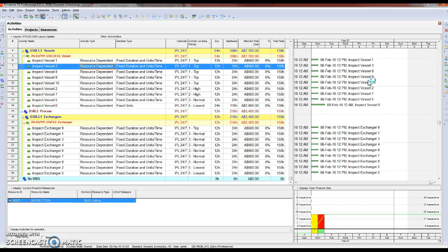They are simply a vertical hierarchy of the structure of the plant or the facility that you are representing in your plan. So the phase is a horizontal timeline that we can identify with milestones or limitations in a calendar that says here is the time frame in a horizontal timeline for pre-work or shutdown or opening phase or inspection phase or closing or post phase.